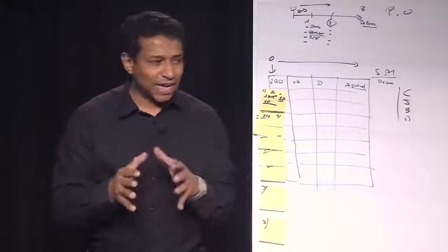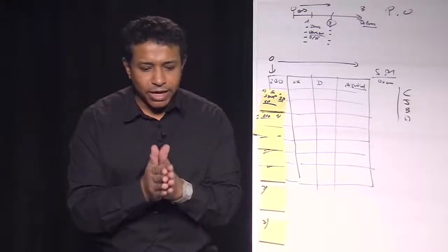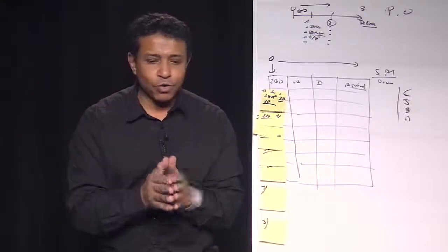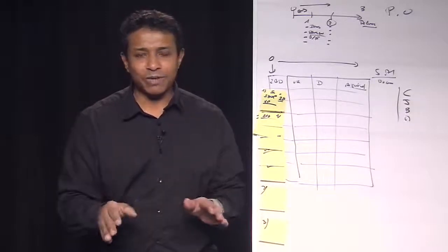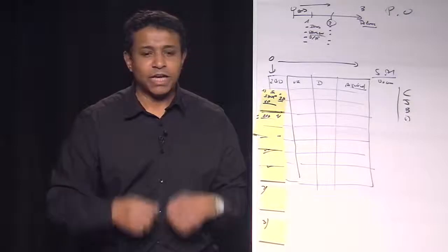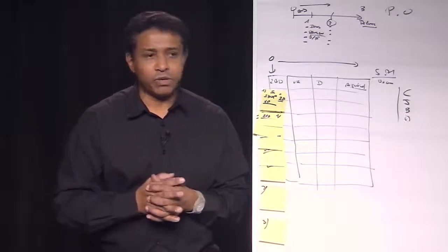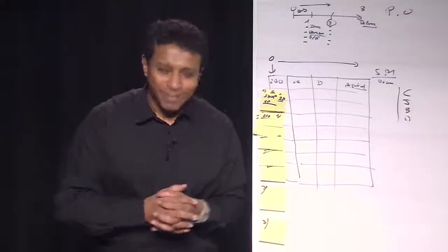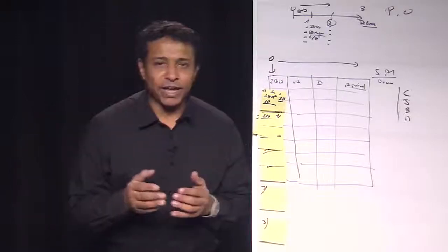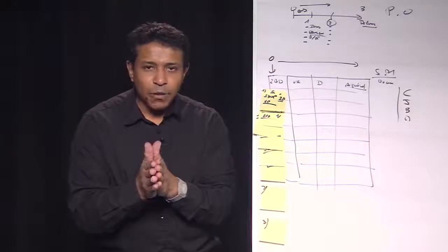So, to say it again as a sum up. In the morning, all together, we do what? Simple, time boxing, no possibility to say more. During the day, by experience, let's say 2 p.m. after eating, let's meet together again and say, are we on time?